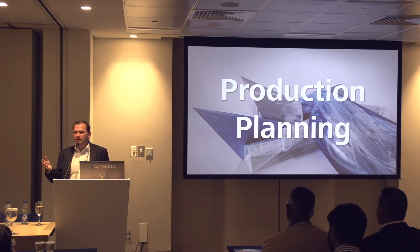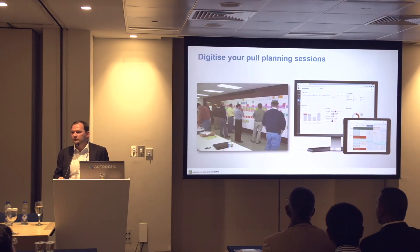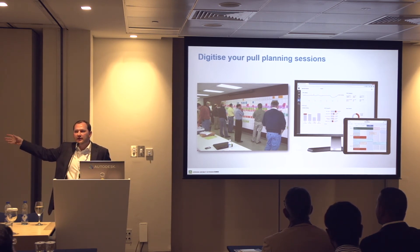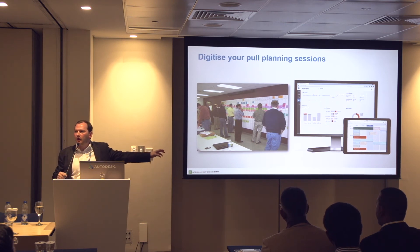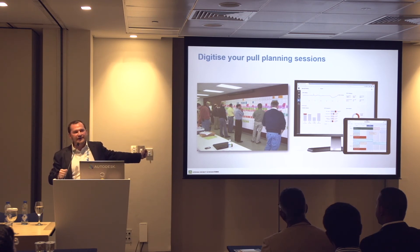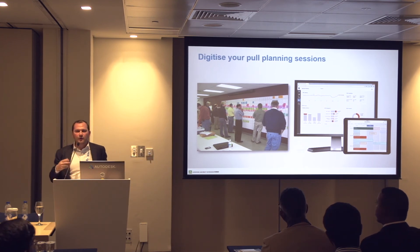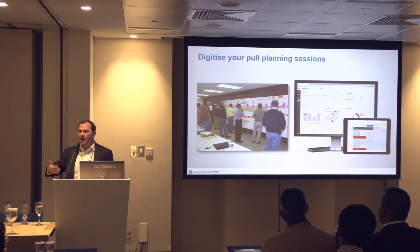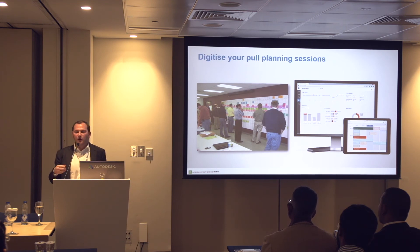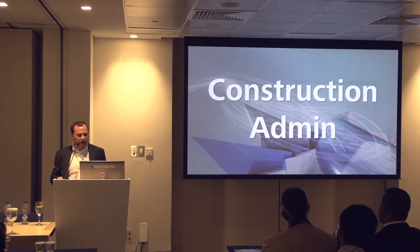Is anybody aware of any sites doing lean construction? Has anyone seen where you've got post-it notes up on the wall, doing a pull planning session — before I can do my piece of work, I need you to have done this and this? This is how it's done pretty much all over the world, perhaps in Excel, but most of the time on post-it notes on a board — which is fine until it gets windy and you've lost all your work. We've got a tool we released this year which allows you to digitise that process, so anyone on the web or from their iPad can start adding their dependencies on other people's work and track what's been done. It also allows root cause analysis and reporting you never would have been able to do from post-it notes.